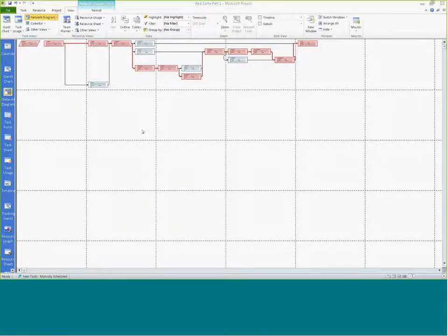They're just saying identify two here in the text. What I would consider to be sensitive would be merge activities, which have multiple activities coming into them and are on the critical path.